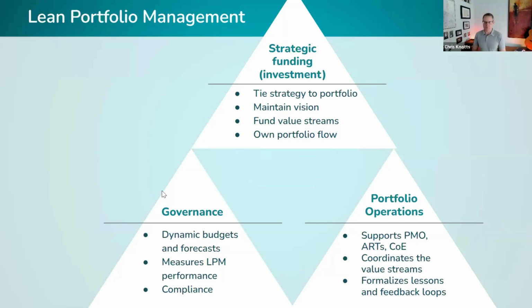Also, just to secure commitment to a framework like this, because there are a lot of teams and orgs out there who talk about things like LPM, who talk about things like SAFe. But if you think about the true value stream from business need out to value as measured in dollars, the only way that's really being measured is with the annual budgeting cycle. If we were in a room right now, I would ask everybody, raise your hand if your budgets are handled on an annual cycle. It would probably be most of us, right? To me, that's a big red flag, because it doesn't matter how much you decompose your cycle time underneath the annual budgeting cycle. If the master cycle is still the annual budget, then sorry, but we really haven't reduced our most important cycle time in any meaningful way.